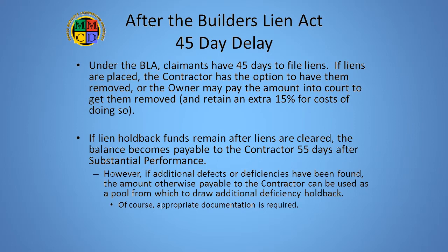However, once it is known that there are funds due to the contractor from the former lien holdback fund, those funds revert to normal payable status. In other words, if new deficiencies are found, the amount payable may be reduced by the additional deficiency holdback. Now remember, this can only happen between 45 days after substantial performance up to the date of total performance.